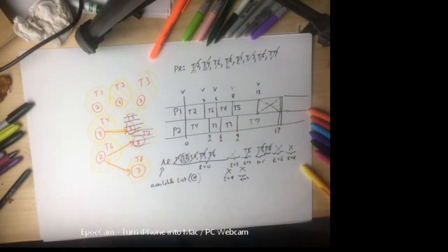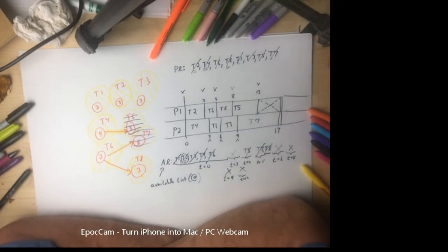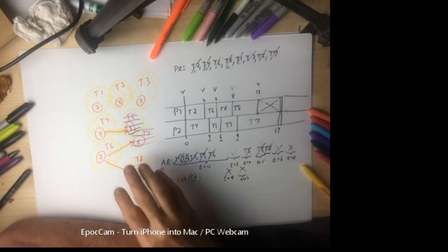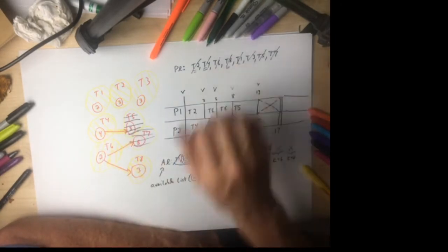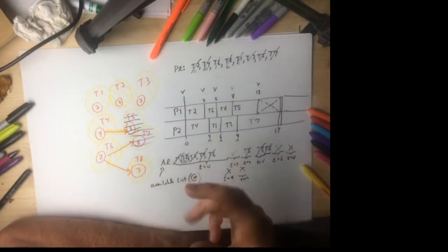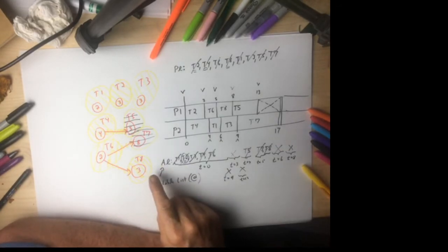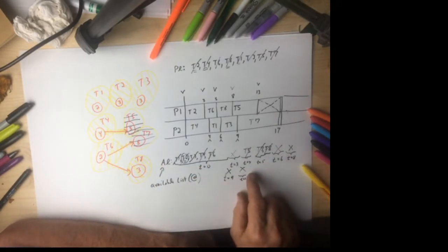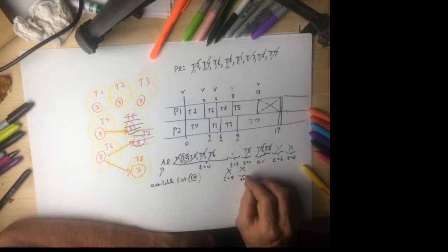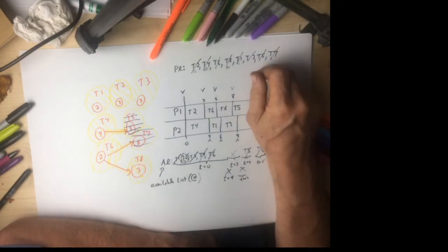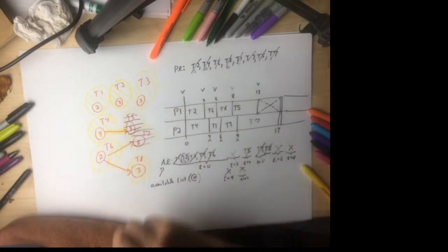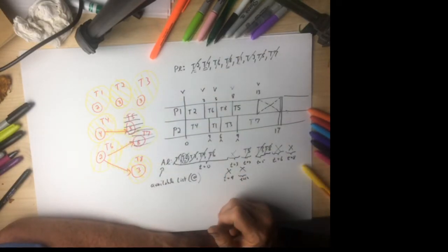So there's our schedule. Now the name of this schedule is the list processing algorithm. The list processing algorithm always starts with a digraph, a priority list, and someone, perhaps you, has picked the number of machines. Your job is to always add and delete from your available list, always delete from your priority list, always update the digraph and repeat this.